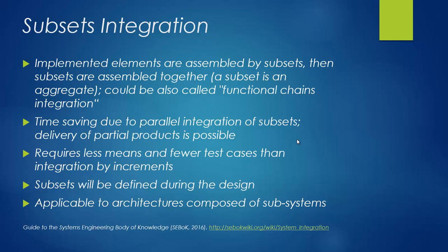Actually, the delivery of partial products will be possible at that point. This technique requires less means and fewer test cases than integration by increments, because we can do the test for the subsets. Subsets will be defined during the design phase. Such a technique can be applicable to architectures composed of subsystems.